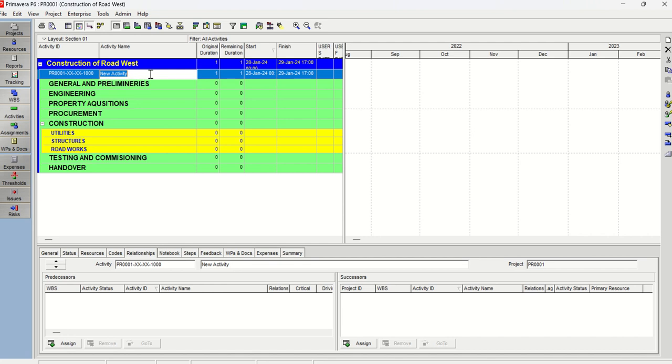All right, but if you see here the settings we did before we start with importing the activities, we just did that ID prefix and suffix. This is an example and our default setting. So it's automatically added in when we create the new activity. That's the usefulness of doing that settings here, so you don't need to add these in manually.